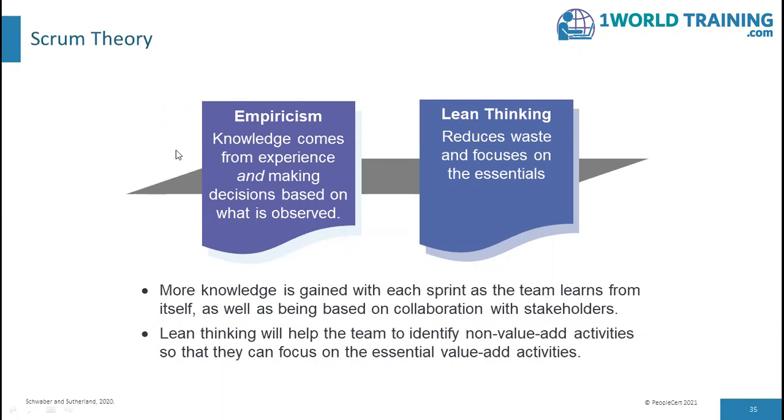Empiricism, another way of looking at it, is the Deming cycle of continual improvement, wherein an improvement is planned, the improvement is undertaken or performed, then it is checked whether the improvement occurred or not. If not, certain corrective actions are taken, which means that observation is done in order to take the next steps. And that is known as the plan, do, check, act cycle.